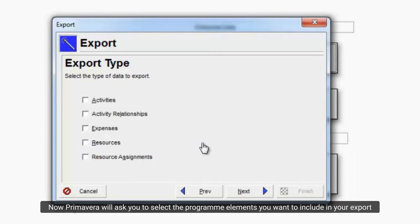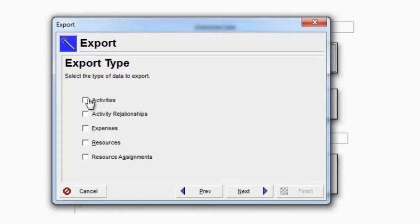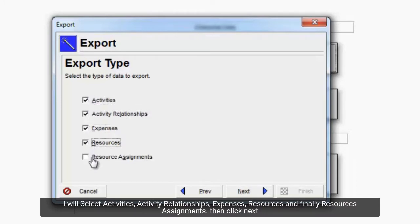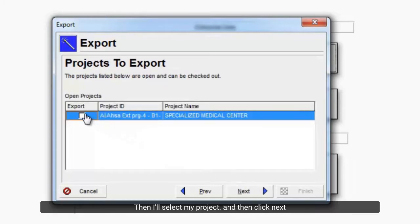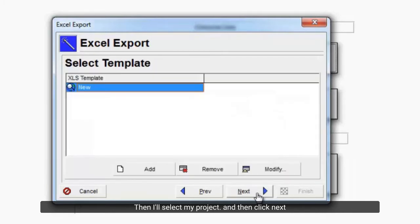Now Primavera will ask you to select the program elements you want to include in your export. I will select Activities, Activity Relationships, Expenses, Resources and finally Resources Assignments. Then click Next. Then I'll select my project and then click Next.